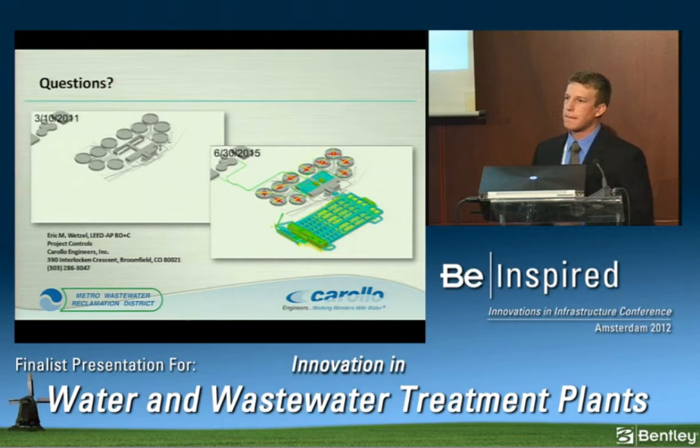As far as field measurements, or yard piping and all that goes, if we do have record drawing changes, if a contractor lays a pipe and it doesn't end up in the exact location where it was in the design documents, we do update that. We do reflect that in the model when we do our quarterly updates. So the survey data does get back to us, and we do add that to the model.